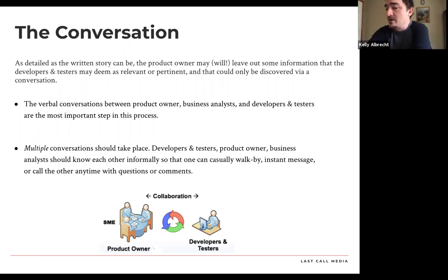in appropriate ways. But a very popular meeting, which is usually a few days before sprint planning, is called a refinement meeting. And that is where a lot of conversations can take place about the stuff that's getting to the top of the backlog. And you're really having those initial conversations and trying to surface what's confusing about these ideas that we're trying to get done. What can we do to make this more ready, to make this closer to getting that confirmation? So if you remember the 3 C's of user stories: card, conversation, confirmation. We really want to get to that part where we're getting that confirmation, and that's gonna be the last few